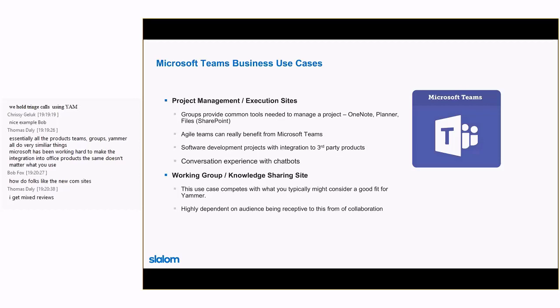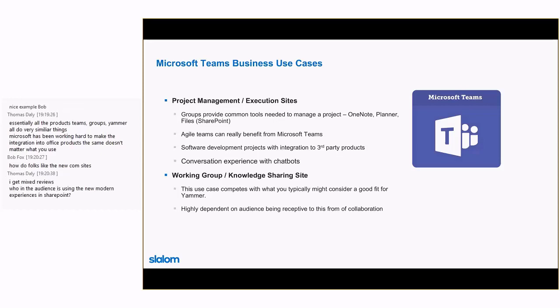Teams works pretty good, and people like those conversations, and you can do that planning poker to figure out how complicated a user story is. You can manage the Kanban board, accessing it pretty quickly from your Teams. So it's kind of cool. And again, for me, being into chatbots, you can actually build those and add them to your Teams, and then interact and have interesting experiences with them.